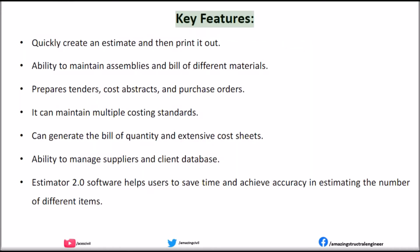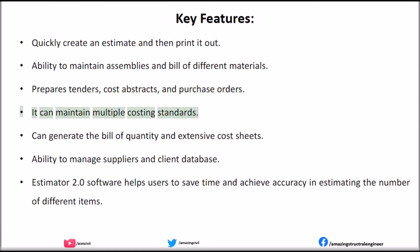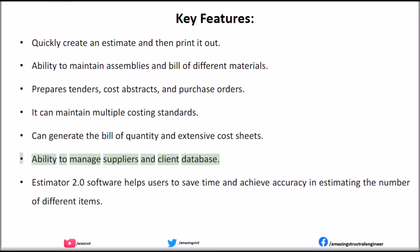Key Features of Estimator 2.0: Quickly create an estimate and then print it out. Ability to maintain assemblies and bill of different materials. Prepares tenders, cost abstracts, and purchase orders. Can maintain multiple costing standards. Can generate the bill of quantity and extensive cost sheets. Ability to manage suppliers and client database. Estimator 2.0 helps users to save time and achieve accuracy in estimating the number of different items.